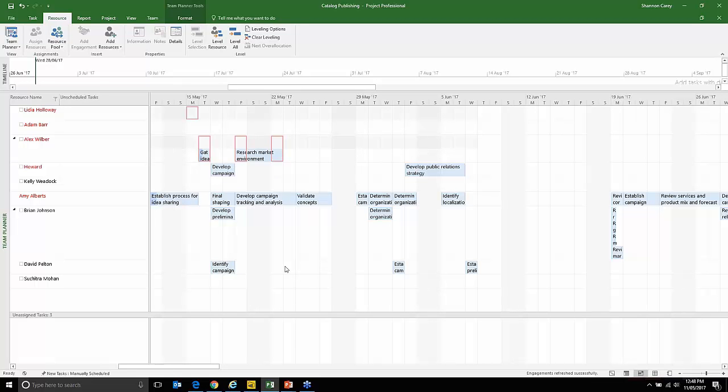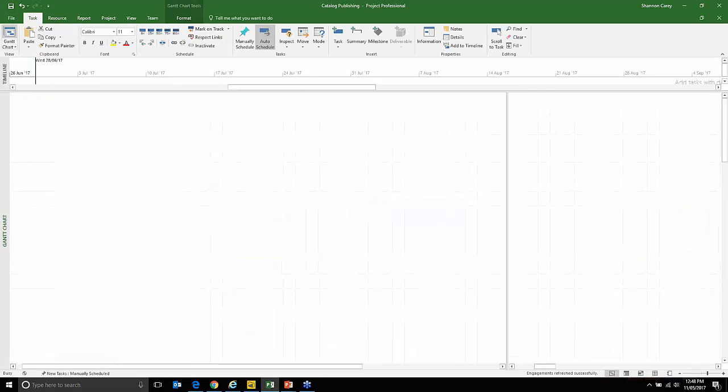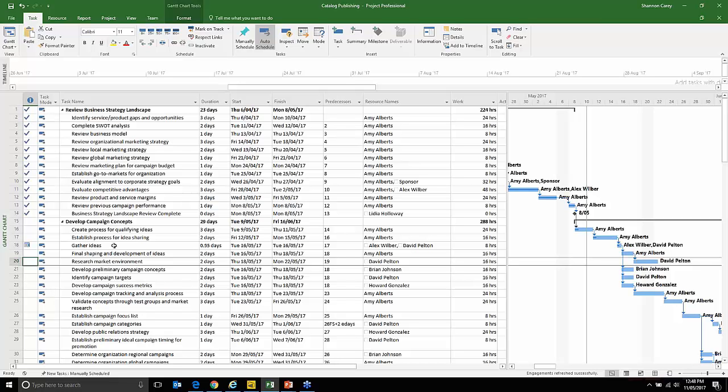He's another analyst on the project. So we want to send some of these tasks across to David. That's quite easy to do. All we need to do is pick that task up with the mouse and then go and drop it down on David. There we go. I've just rescheduled that task to David. When we go back into the Gantt chart view or into the list view, we can see that that's all been sorted out now. There's no red men anymore. That's all corrected.